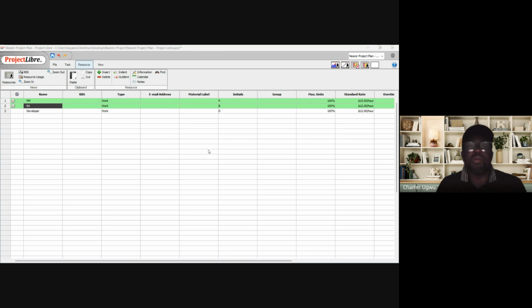And then the BA will tell you that from 26th to 30th, I will not be available. So mark it on your calendar. All you need to do is hold the Control button on your computer and highlight 26, 27, 28, 29, 30. Five days not available.